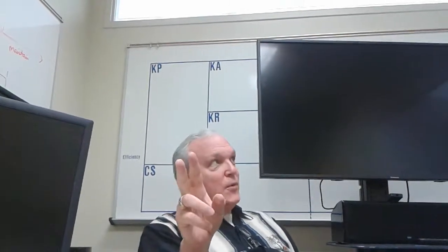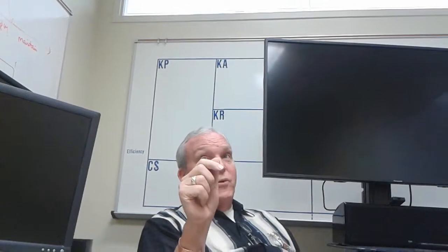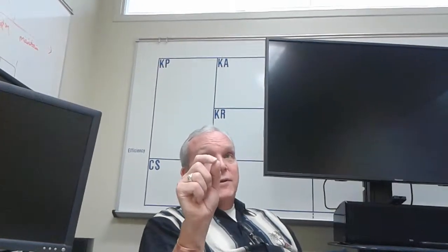Now the second problem arose in that they made the PeopleSoft engineering team manager the project manager. And that is a mistake. That's a big mistake. What we've learned over the years is that the technical expert is not the best project manager. Yeah. The project manager needs to be able to see a lot more than the technology. That's right. And when you make the technical expert the project manager, they see this much. Right. And they kind of don't see what's outside of there. Yeah. And so we proved this at Intel, in our R&D department. Don't make the technical expert the manager.